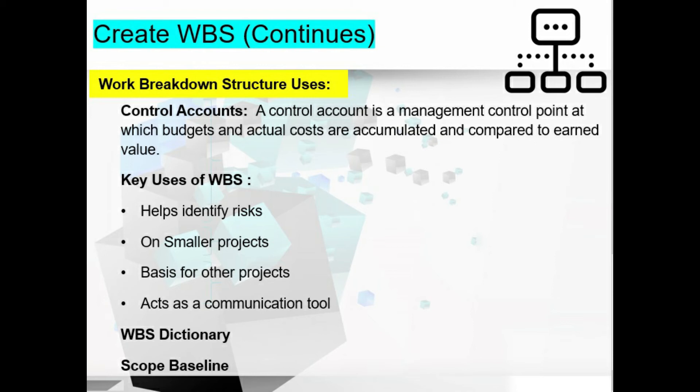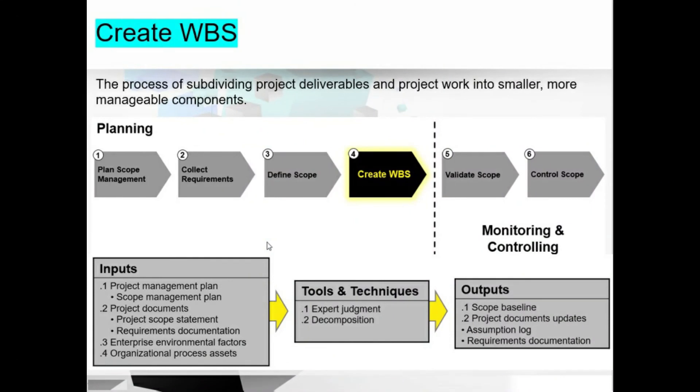The WBS dictionary prevents scope creep before work starts on the project. It can include descriptions of schedule milestones, acceptance criteria, durations, interdependencies, and other information about work packages. The scope baseline is made up of the final approved versions of the WBS, WBS dictionary, and project scope statement — approved at the end of planning before project work begins. The inputs to create WBS are the scope management plan, project scope statement, and requirements documentation.